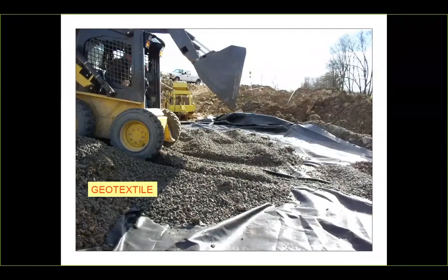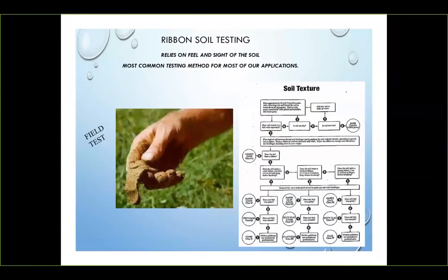You're back to checking materials, making sure that your geotextile is what was called for in the specification, woven versus non-woven. Make sure you have your overlap. Make sure the material that they're bedding on that geotextile is appropriate. There's an aspect of this that we're going to talk about, the soils and all that. We're not really skipping over it, but we just want to talk about the materials at this point. But I think that should be coming up right next.